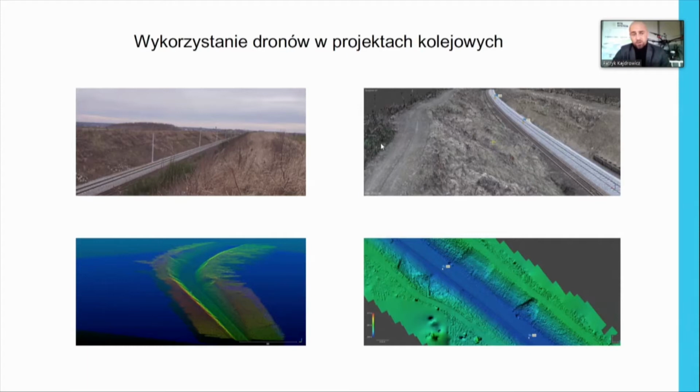And using drones for railway projects, this was reinforcement of slopes of a railway line. The first is a terrain area with high grass, and also sliding grounds with very undense aggregate. That was in autumn, so the ground was very important. Instead of sending land surveyors, we did a 2 hour flight, and it was enough to verify the area.